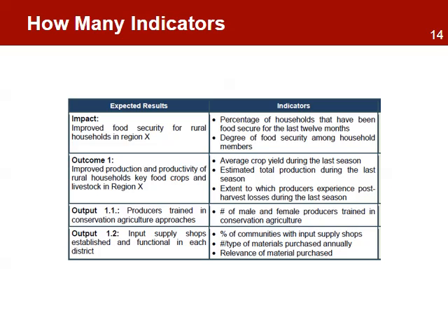Multiple indicators may be required to measure output, outcomes, and impact effectively. A general rule is to select 2 or 3 indicators per result level, which are both quantitative and qualitative. This is to ensure that the project is measuring the same result from different angles. Most importantly, indicators should be set to collect only what is needed in order to measure the relevant results. Collecting too much information is costly, time-consuming, and most often unnecessary.